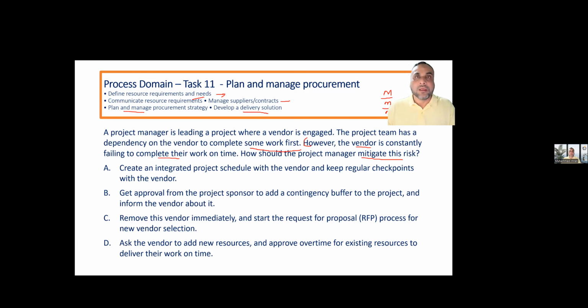Remember this: do not find an answer that says fire the contractor, remove the contractor. It's a difficult part. It shouldn't be your first answer, because hiring another contractor will require a lot of resources and a lot of time, which can increase another delay for the project. It should be the last step, but not the first step. So let's go and read out the options.